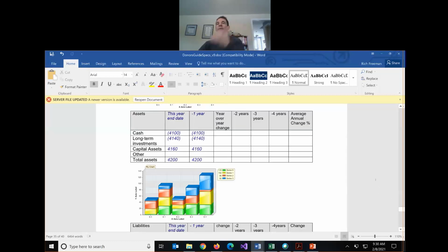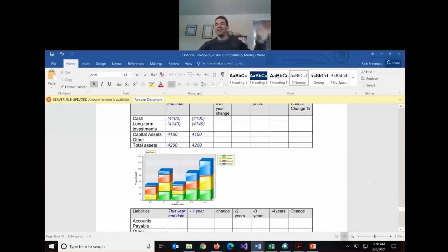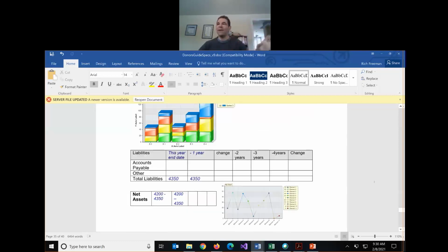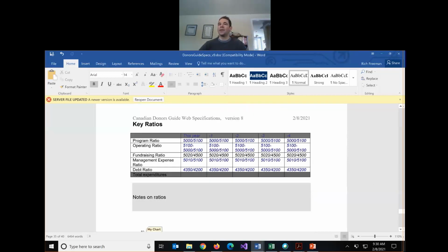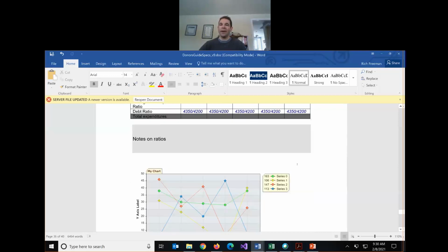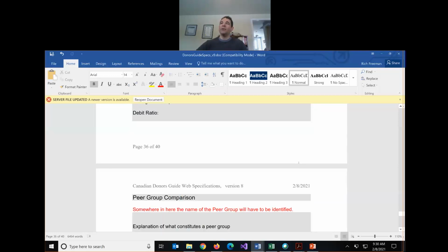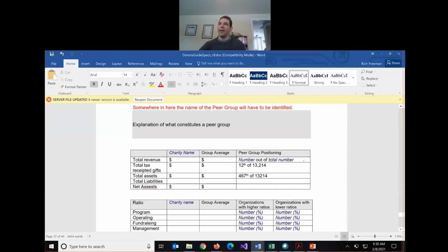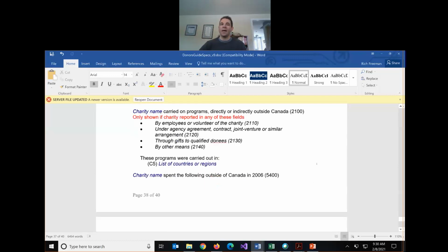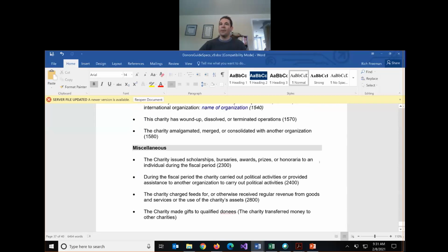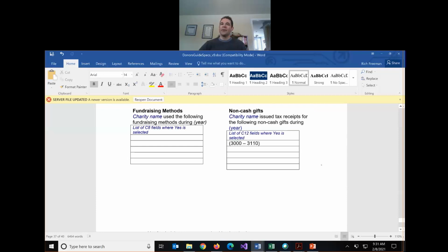But it meant by the time we went to write the code, all the decision making was already done. We already knew everything that we had to do in great detail. We didn't have to keep going back to the client. But we did have to come up with 9 versions of this document until he finally signed off on it. So it was good in that it gave us a super clear picture of what we had to build. It wasn't great in that it didn't really allow for flexibility. Once we'd spent all this time documenting this stuff and he signed off, we were sort of locked into it.